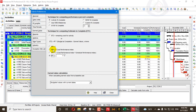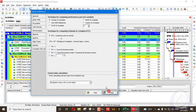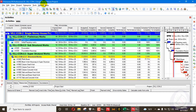Admin Preferences settings are applied when you are creating a new project, importing a project from another database, or importing from your system. User Preferences, on the other hand, take effect when you open an existing project. An already open project cannot be affected by Admin Preferences changes, as Admin Preferences may be controlled by multiple users. I will close this since it will not impact my current schedule, but I will show you how this option works in detail.